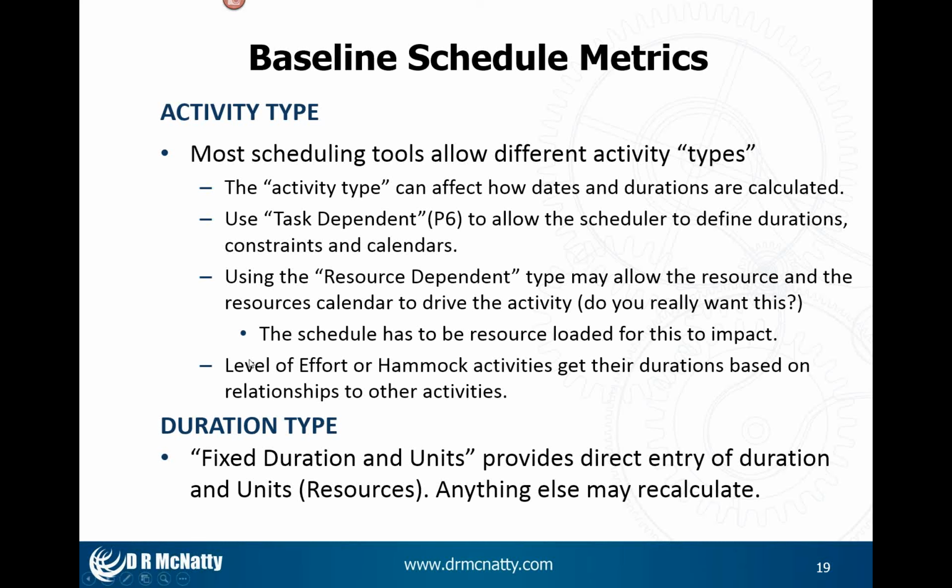So if I have resource dependent but I'm not resource loaded, then it probably isn't going to have any impact. And I've seen this happen where parts of the schedule might have been done by someone else in another tool and then imported, and so they come in as resource dependent and probably should be changed to task dependent before the original baseline has been submitted.